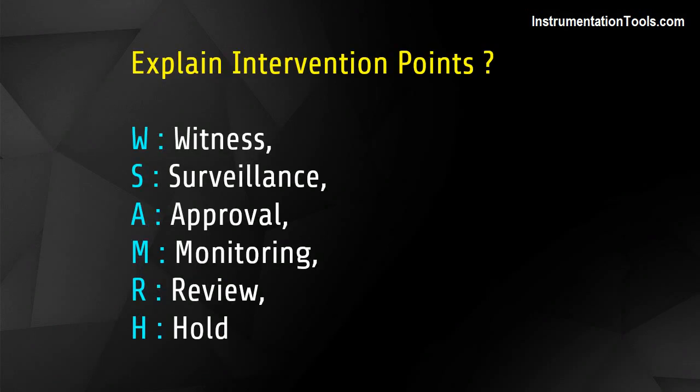Explain intervention points. W – Witness. S – Surveillance. O – Approval. M – Monitoring. A – Review. H – Hold.